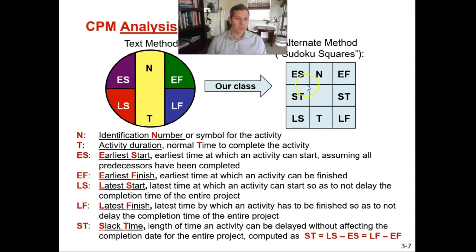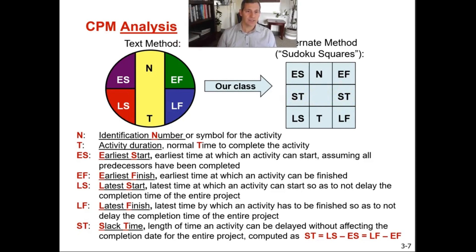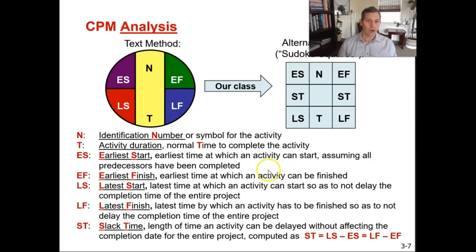Slack time is the length of time an activity can be delayed without affecting the completion date for the entire project. We compute slack time by taking LS minus ES (latest start minus early start), which gives you your slack. You can also compute it as LF minus EF (latest finish minus early finish) — and that will give you the same number. A key piece of advice: if you ever get a different slack time on the right versus the left, you have done it wrong. The slack time on both sides must always be exactly the same number.